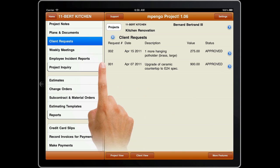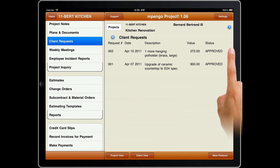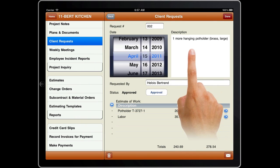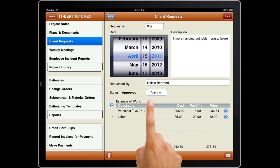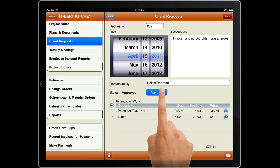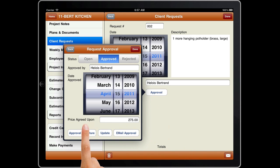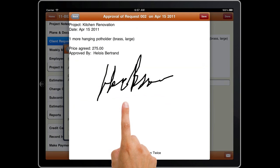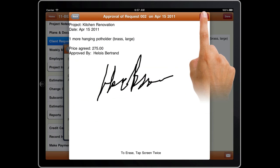Client requests take change orders even further. It helps you take the client request, helps you estimate costs and prices, helps you get approval and a signature, and then documents and emails everything, automatically generating the change order.